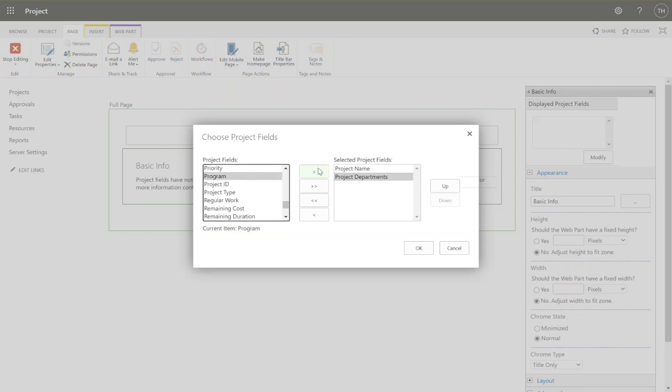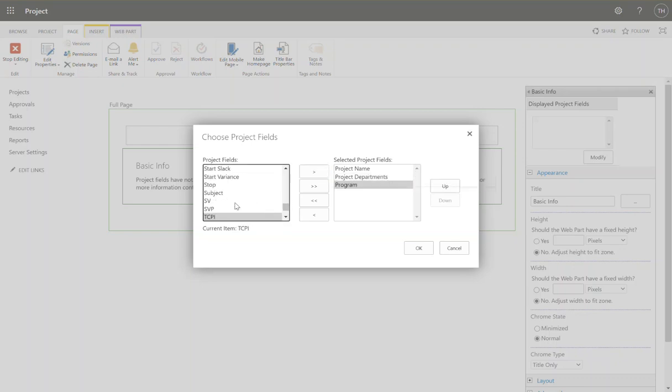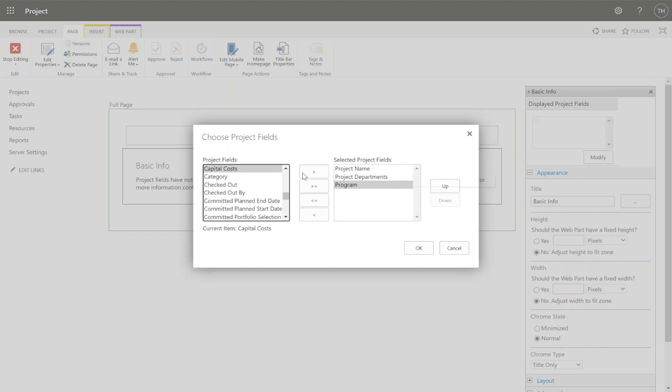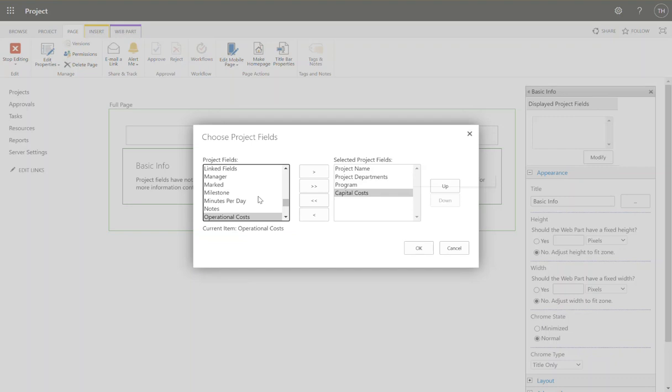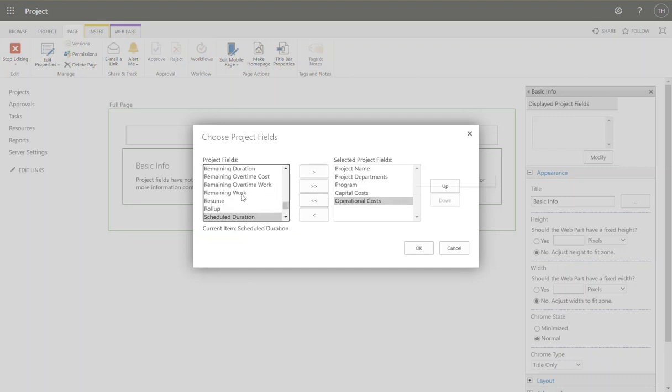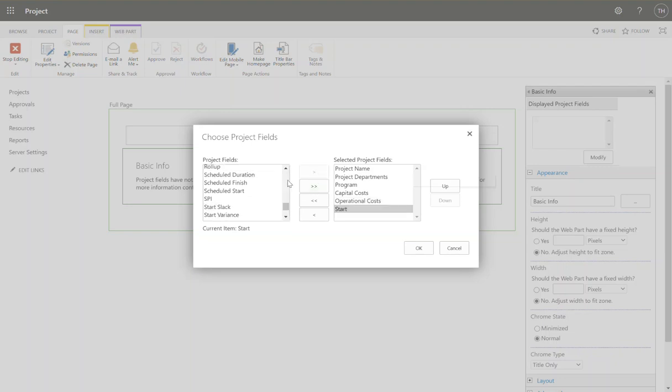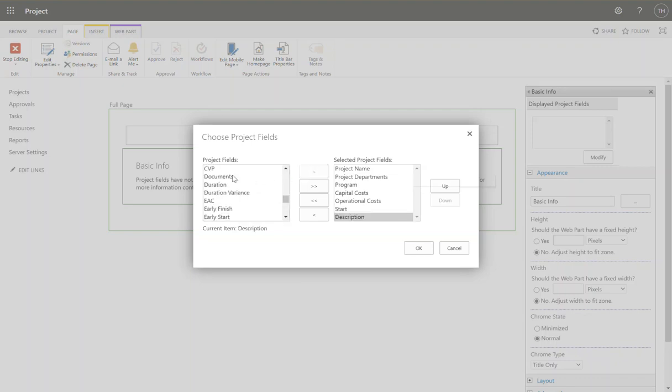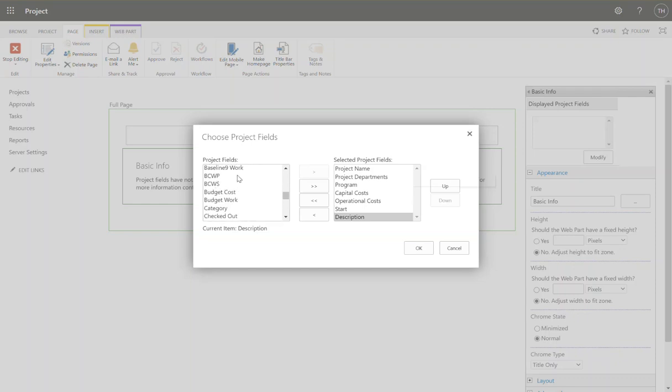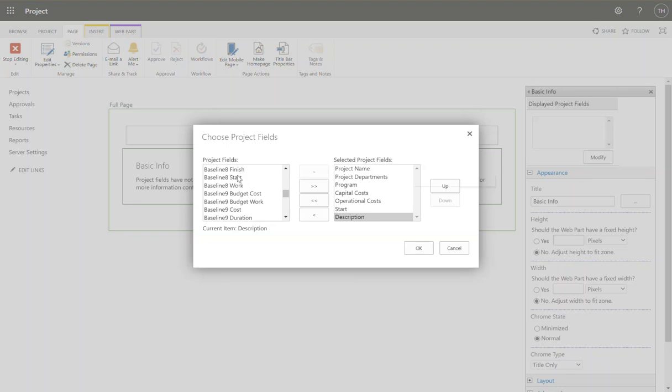What program? That's my custom field that I created. What about total costs? In fact, it was capital costs. Operational costs. Let's add those in as well. You also probably want to have some standard ones that I add in every time, which is going to be the start date of the project. This will actually dynamically update the start date of your project schedule. You can also have description. You can see a whole list of out of the box fields here that you can leverage, and you'll also be able to find any enterprise custom fields that you create. I'm keeping this really simple for the purposes of these videos, but the world is your oyster.